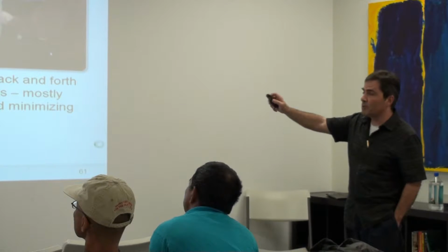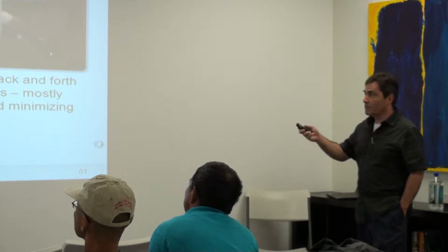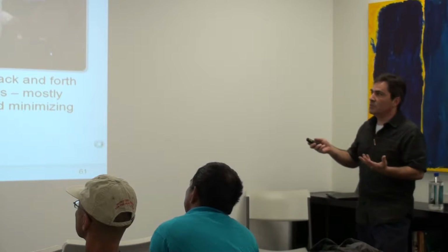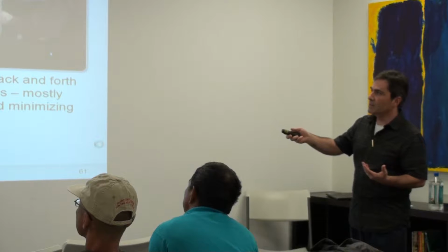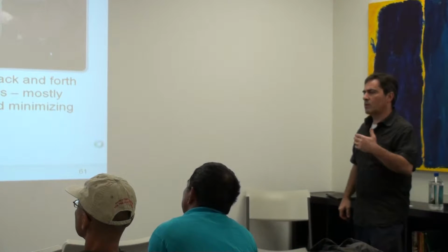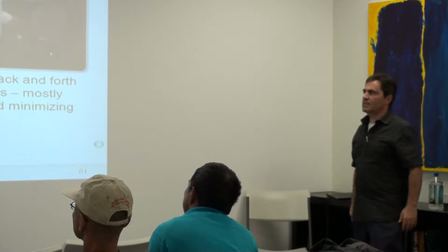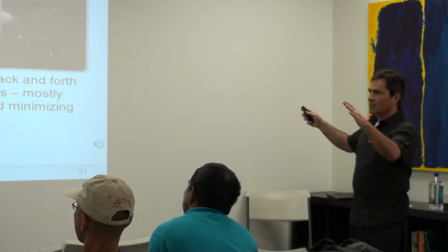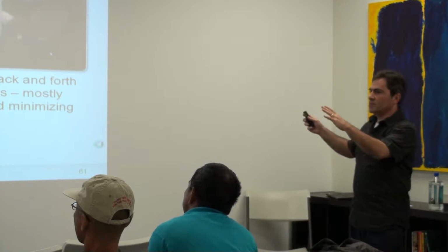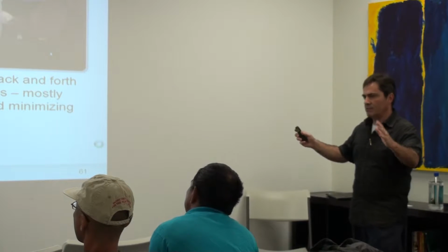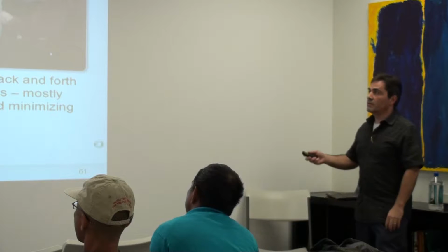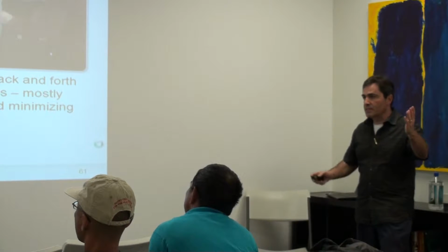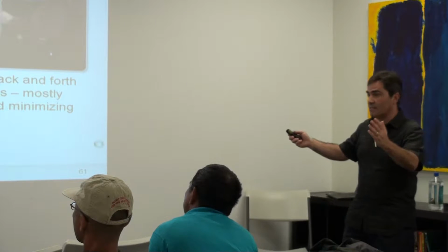They use multicolor Post-its. The Post-it colors actually mean different things. So that, for instance, if you're using the color orange for spikes or experiments, they stand out. And that way you can kind of look across the room and say, gosh, we got a lot of orange. There's a lot of research going on. Or defect fixes could be red. So when you look across, you can see there's a lot of defects for fixing this PSI.